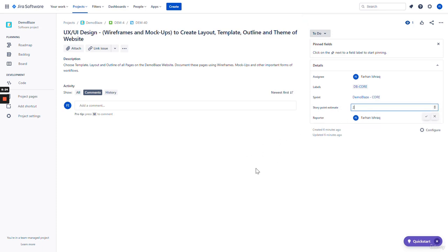A story point of 2 would be a little bit more complex, but also on the simple side. A story point 3 is medium complex, whereas a story point 5 is of very high complexity, requiring several days or even a week to complete based on the user requirements and the amount of work required in terms of time and effort.